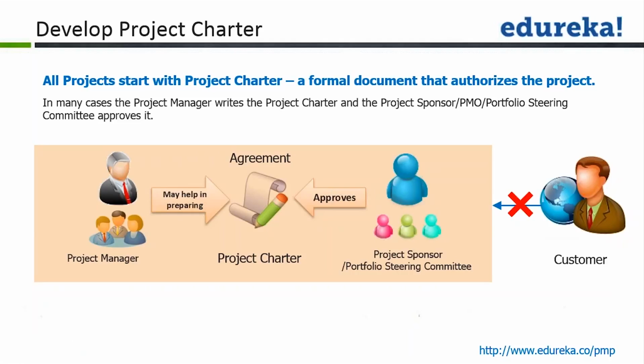Project team is represented by the project manager, and the senior management is represented by the project sponsor. This is an agreement which is also going to act as a guiding document for the project team. Project charter will have the high level data like your statement of work, what exactly we are planning or we are going to deliver through this project.